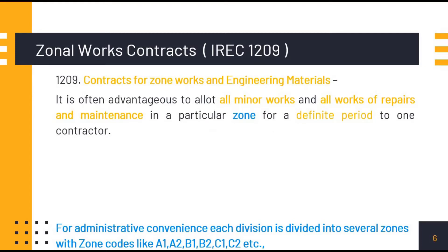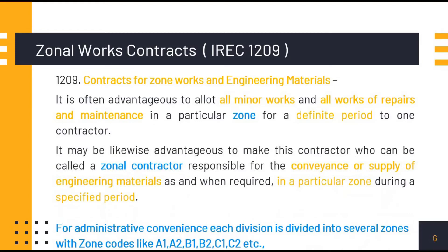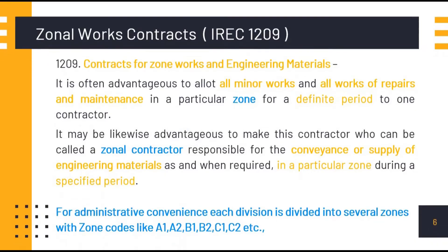According to Engineering Code Para 1209, under Contracts for Zone Works and Engineering Materials, it is often advantageous to allot all minor works and all works of repairs and maintenance in a particular zone for a definite period to one contractor. It may likewise be advantageous to make this contractor — who can be called a Zonal Contractor — responsible for the conveyance or supply of engineering materials as and when required in a particular zone during a specified period.